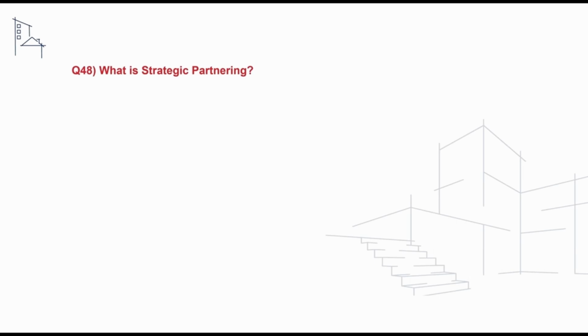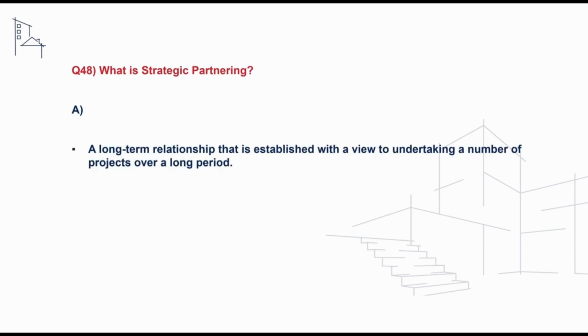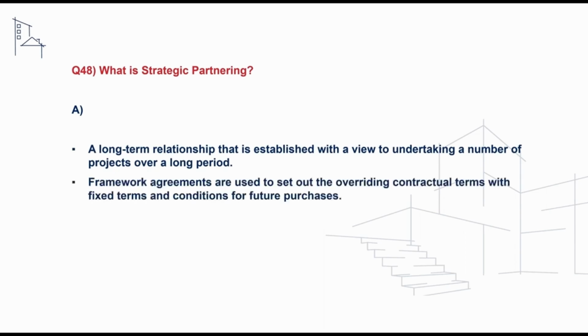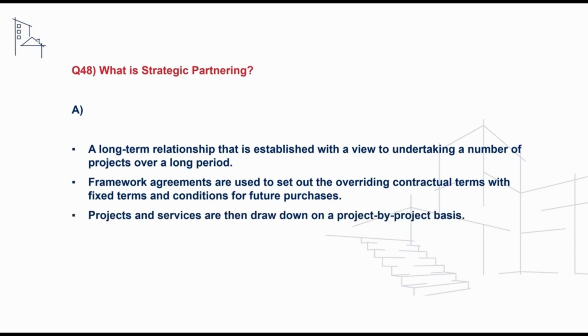Another question candidates may receive is what is strategic partnering? And to address this, we can say this is the formation of a long-term relationship that is established with a view to undertaking a number of projects over a long period. Framework agreements are often used to set out the overriding contractual terms, with fixed terms and conditions for future appointments, and projects and services are then drawn down on a project-by-project basis.